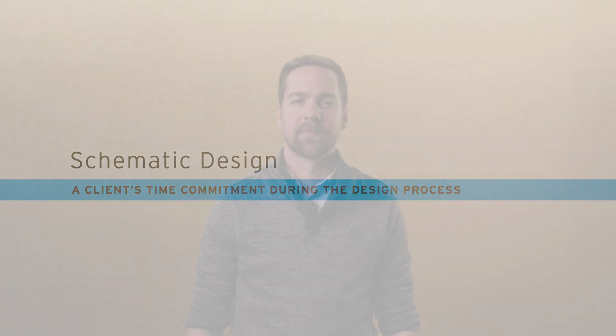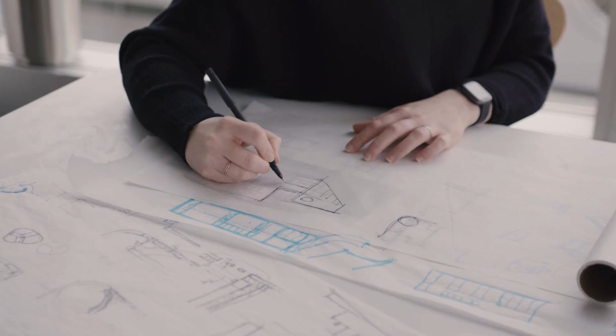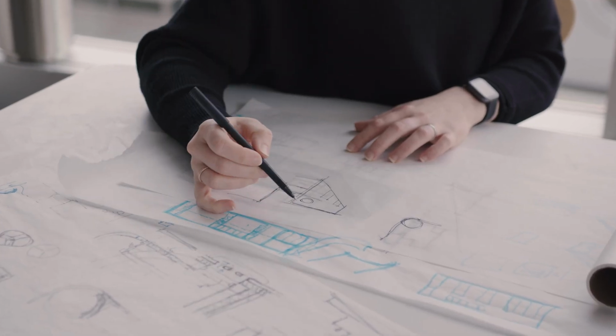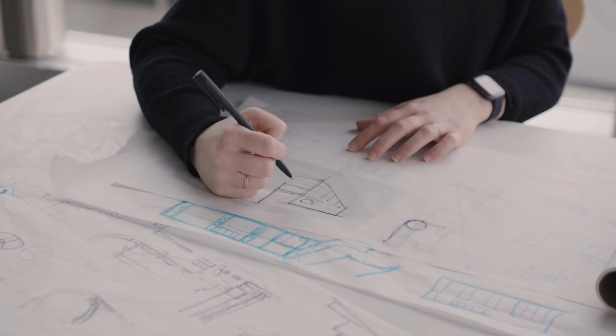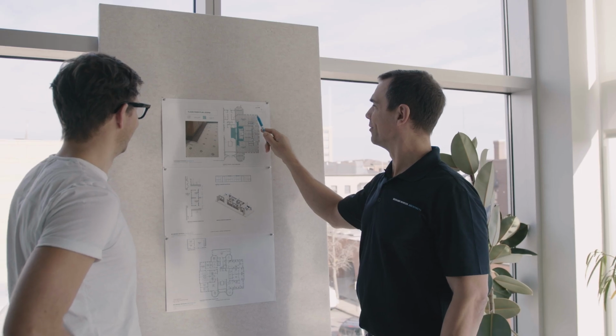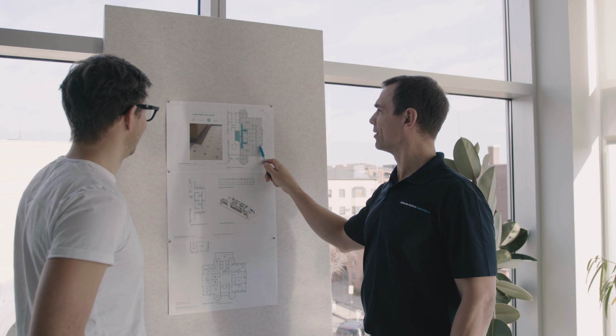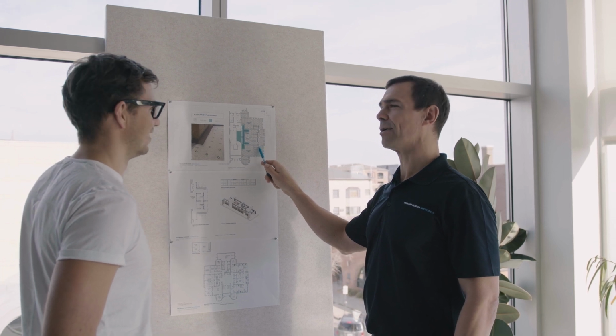Schematic design. While pre-design meetings involve a larger group of stakeholders, schematic design meetings mostly involve your core team. During this phase, your architect will develop concepts, ask for feedback, and provide progress updates. Meetings will be more infrequent, typically occurring once every 2 weeks. Once you've nailed down a concept, you will start meeting with your architect more often.